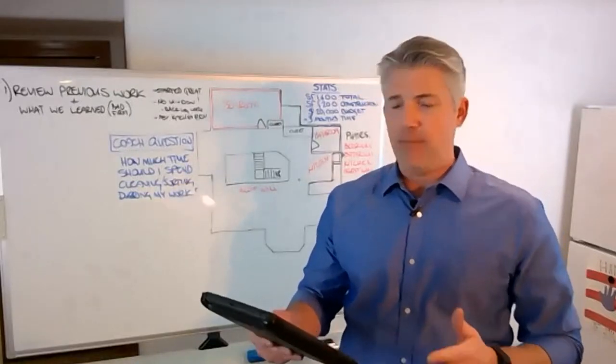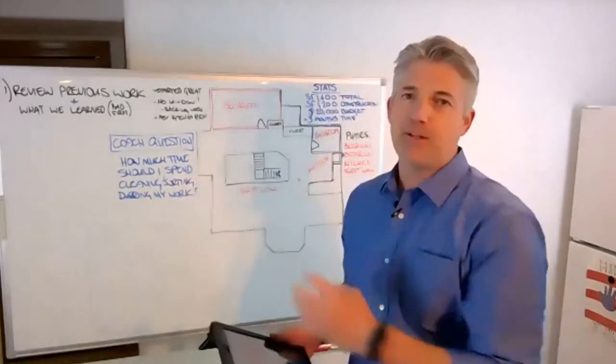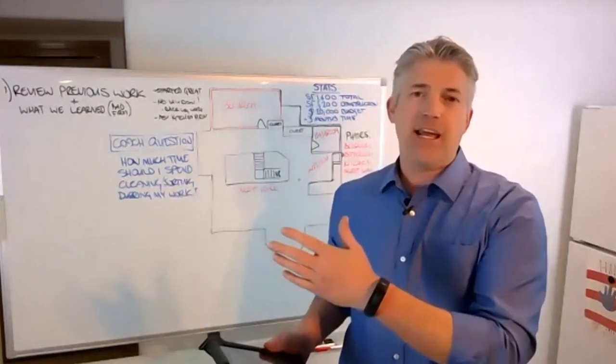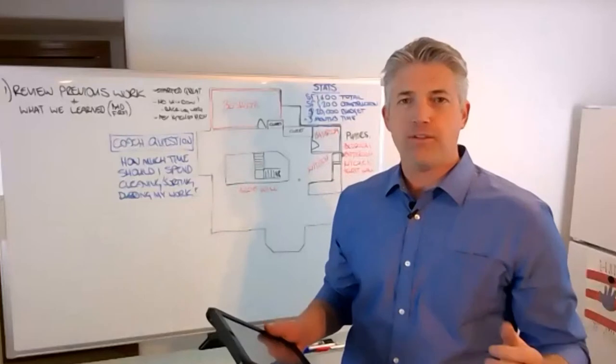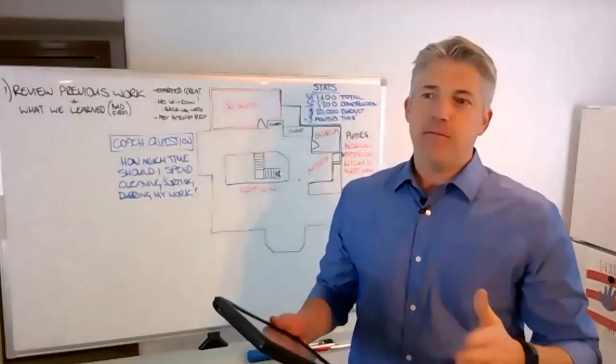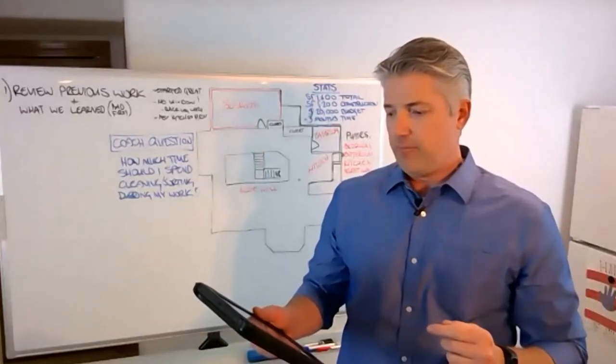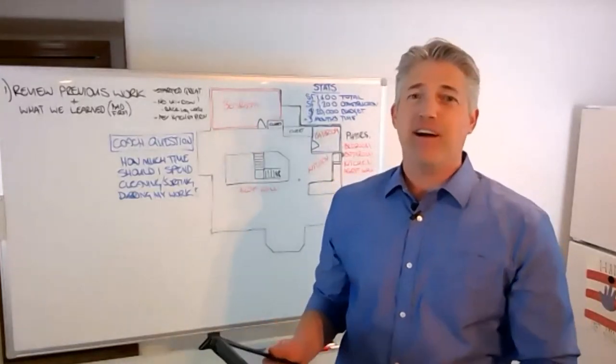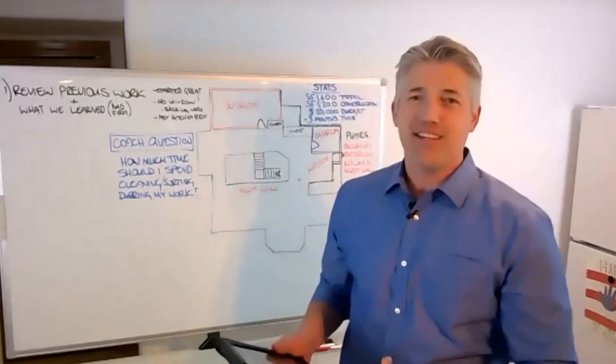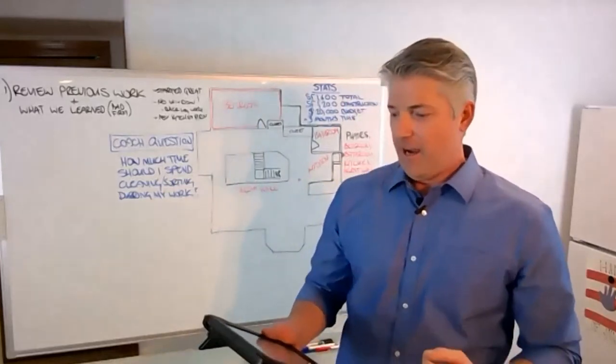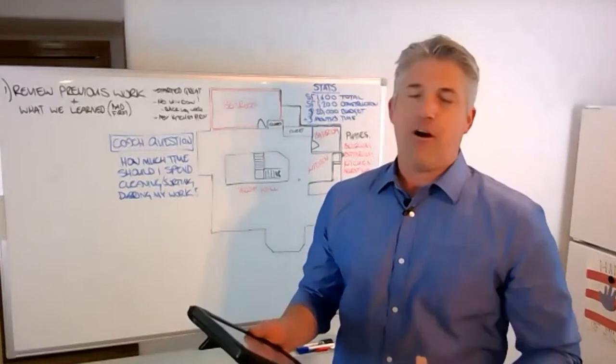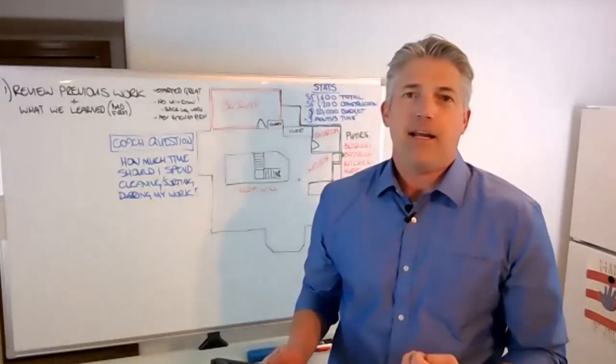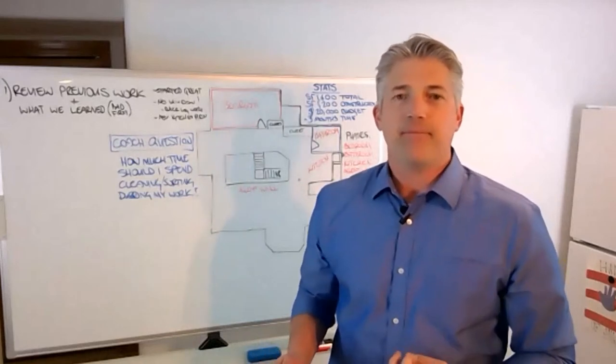Monday, I was focusing on safing off and prepping the space for demolition. Tuesday was demolition day and layout for the walls - I got some of it done, but not all of it due to the window. Wednesday was a staging materials day. I personally had to move stacks of drywall and studs, so I left some time for that. Thursday and Friday was where our plan failed most, and that was driven by our window not arriving per plan.